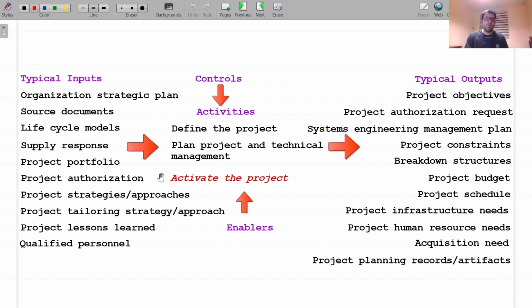The SCMP or equivalent technical planning is an important outcome that identifies activities, key events, work packages, and resources. It references other planning artifacts that are tailored for use on project. The standard ISO IEC IEEE 24748-4 on systems engineering planning is a reference to aid in writing a SEMP. Plans for developing software are often captured in a software development plan.